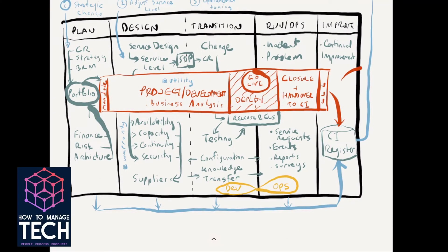And what I'm going to suggest is that we can repeat this whole thing. We rolled out just a piece of the solution, and I'm going to suggest this is using iteration and incremental delivery, where we roll out working pieces of the solution in a very agile fashion. And what we're doing there is repeating the development, the transition, which involves the testing and releasing and deployment, with the running, the monitoring, the learning captured in the continual improvement, and then feeding that back into the next iteration of our solution.